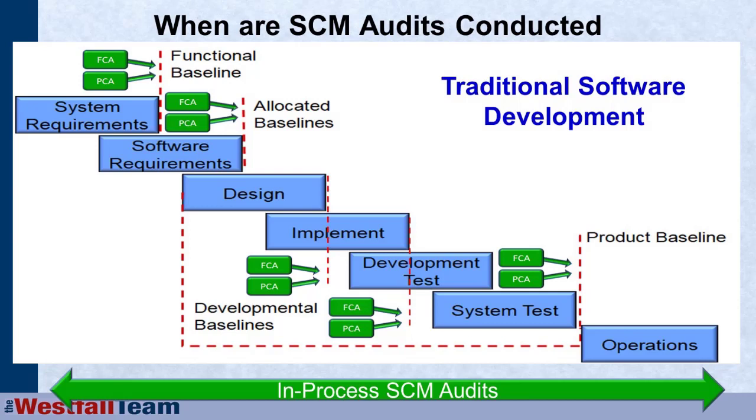We had another one that was a code baseline that was built for each piece of code. Now, this was back in the day, so we were doing C code, so that baseline for each module of code included the .c, the .dat, and the .h file, as well as all the unit test cases for that particular module and its detailed design. And we'd run functional and physical configuration audits to make sure that they'd completely implemented all of the requirements, that they had been built appropriately, that the right versions and revisions had been baselined and brought under configuration control.